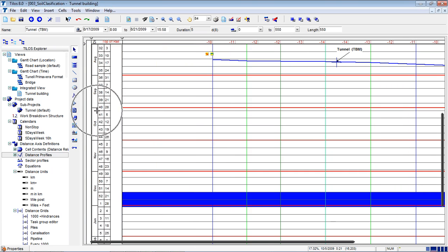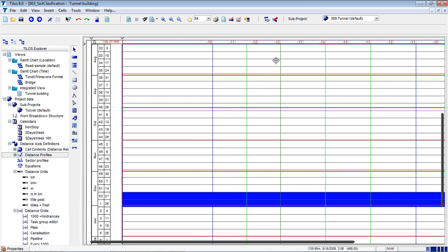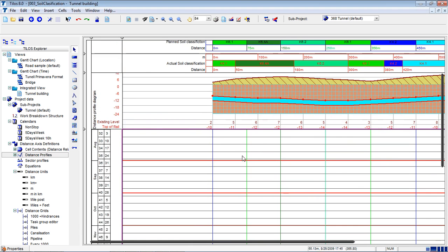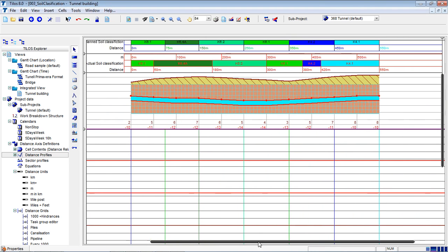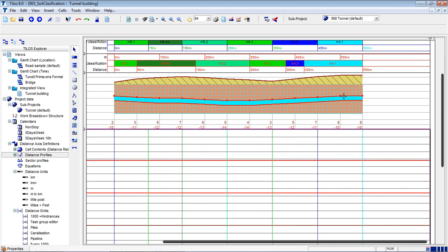In October, the speed of the work will be 2 times lower because this is winter time. Or June is Ramadan time, and during June the speed of work will be 50% less. This is how I can give the activities time and location calculation data. Another question we have, let me just read.